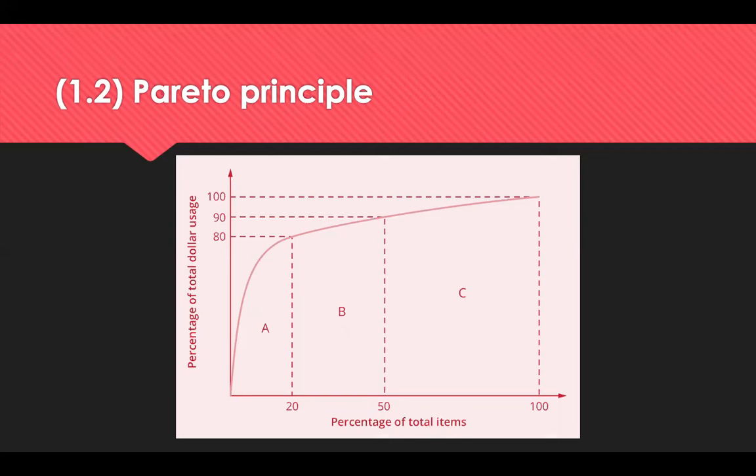Now, in addition to undertaking Pareto analysis, you can use ABC analysis as well. The A items account for 80% of cost and 20% of volume. The C's represent low cost and high volume, and the B's are somewhere in the middle. The time and attention that the resources of procurement should focus on is obviously the category A's. This will give them a better return on the investment of time and resources.